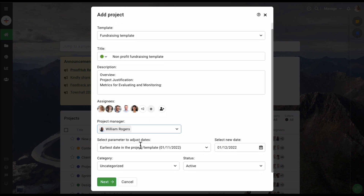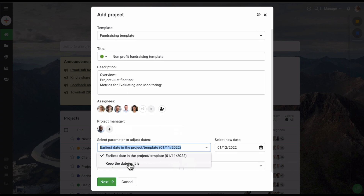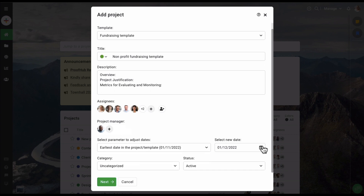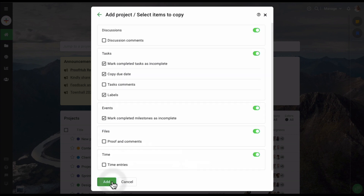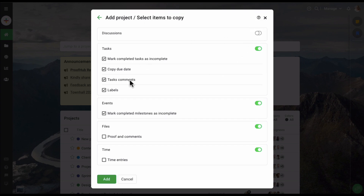While creating a project from a template, you can also easily manage the dates. You can set the earliest date in the template as the new start date, keep the dates from the template as they are, or select a new start date. Now let's click on the next option. On this screen, you can choose what you wish to copy from the template into the new project, disable a section, or select different options. Then click add.